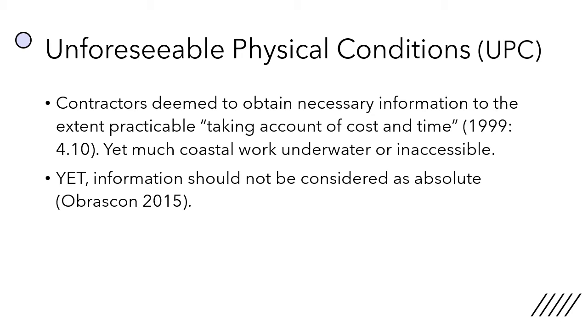Contractors are deemed to obtain the necessary information to the extent practicable, taking account of time and cost. And this is in the 1999 version. This is in preparation of the tenders. Yet most of the coastal work is either underwater or inaccessible. So they don't have a lot of time or cost to be able to do the necessary assessments. So that's on the contractor's liability side.